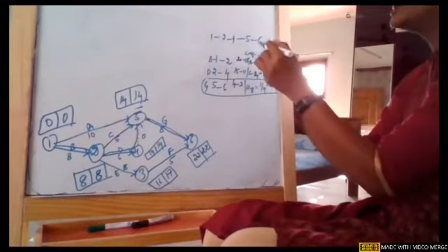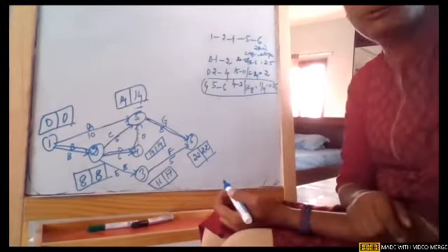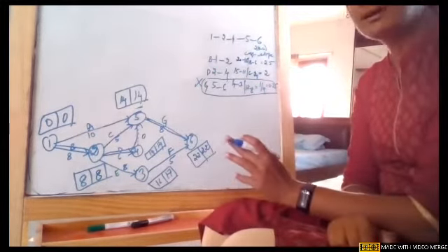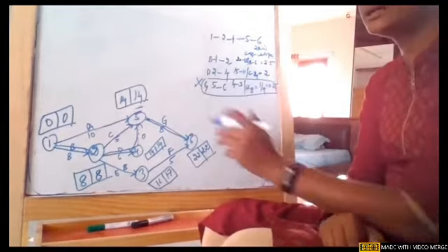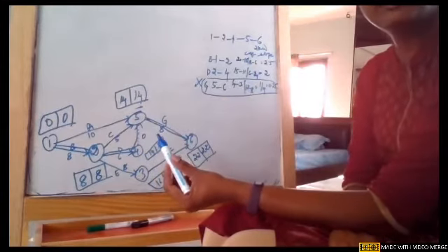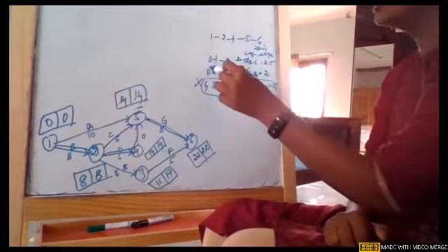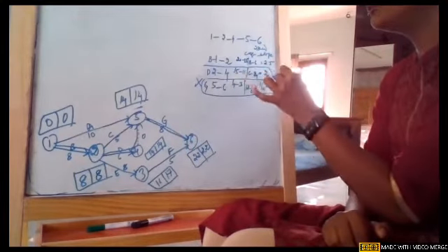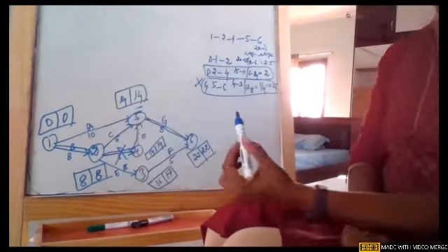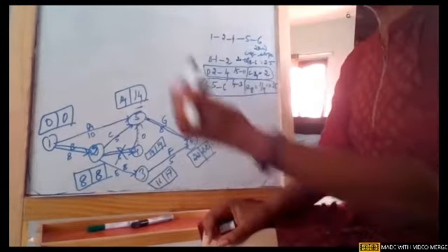But now the duration is 22 weeks. We crashed this. It is done, so I'm just crossing it off. Now, obviously, there is no change in the critical path. Girls, I did not take 4 to 5 because it is a dummy activity. For a dummy activity, we can't apply crashing. Remember that. So now, obviously, the next lowest value is 2 to 4. We will be crashing activity D in the next network. But before that, we will see how the cost has been modified.